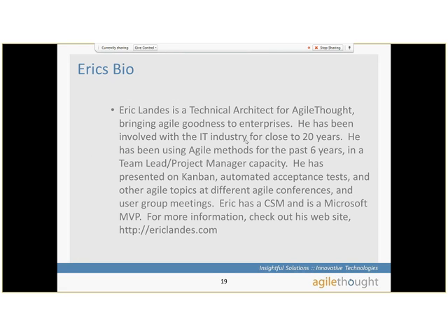It's 3 days to a week, maybe longer depending on your software, of creating a backlog. The whole team is together. We're writing user stories along with the product owner, we're writing wireframes, and we're estimating those stories. By the time you get done with that visioning phase, you have a great backlog that allows you to get a good idea of your release plan.